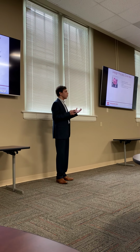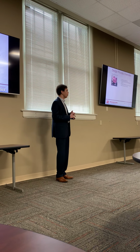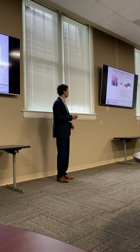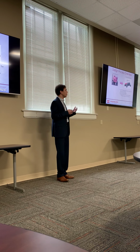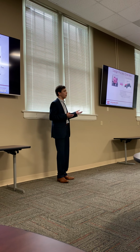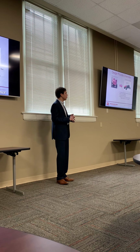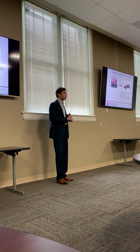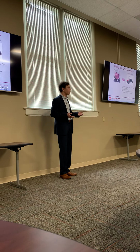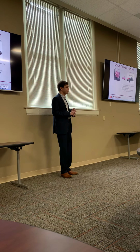Additionally, there was a CO2 tank feature that released a big cloud of smoke every time Bully comes onto the field, and they were very adamant that this feature be in the Bully Car as well. From there, a go-kart was chosen and purchased for the class to serve as the base of the Bully Car, a Tao Motors go-kart. This was chosen to meet initial budget constraints and also timeline constraints to give the class time to work on the car, but it didn't consider weight capacity when that vehicle was purchased.